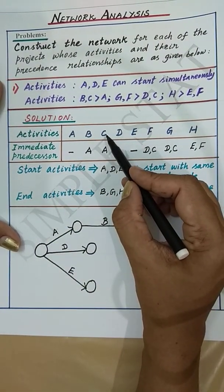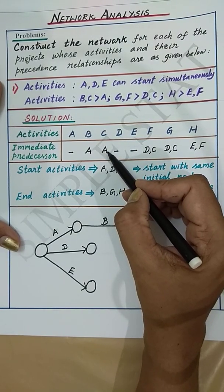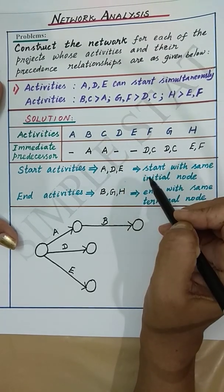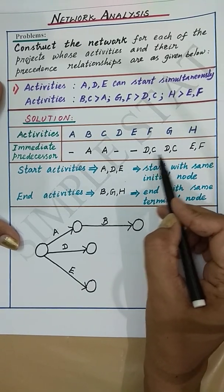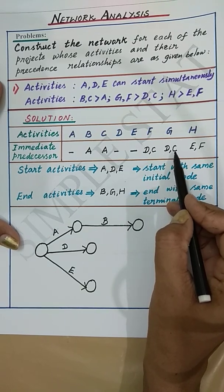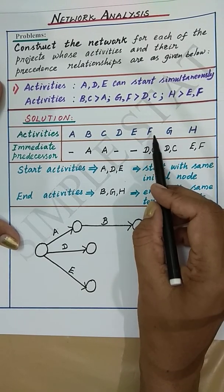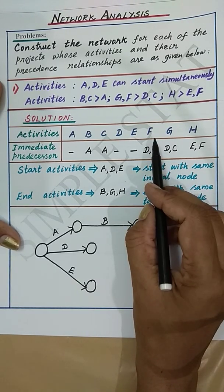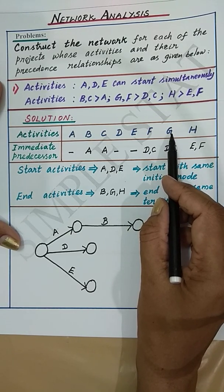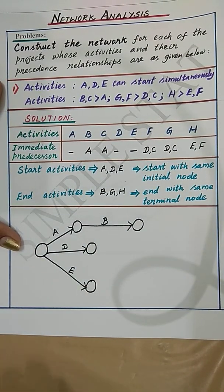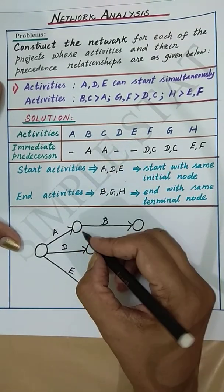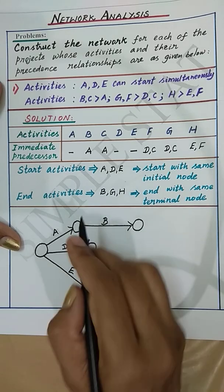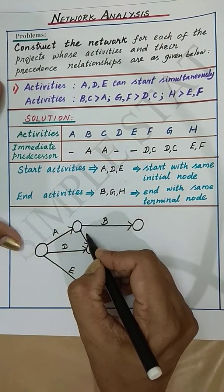Next is activity C. Activity C can start after the completion of activity A. Before drawing activity C, we have to check if C is a predecessor for any other activity. From the table, we observe that activity C along with activity D occurs as the predecessor for activities F and G. This means that only after completion of C and D will activities F and G start. That is, activity C starts after activity A and ends where activity D ends. This is activity C.